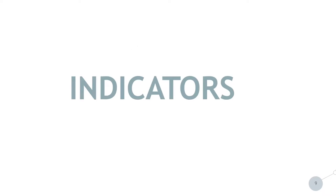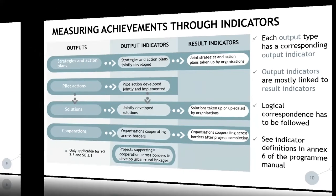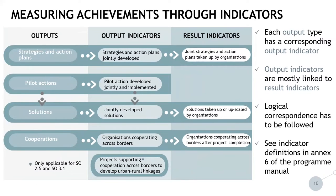Coming now to the indicators — the main question being how to measure the achievements of a project, which is done through a set of indicators. For each of the four output types there is a corresponding output indicator. For example, strategies and action plans have the related output indicator 'strategies and action plans jointly developed.' In the same logic, there is also a related result indicator — in this case, 'joint strategies and action plans taken up by organizations.' This logical correspondence is to be followed.